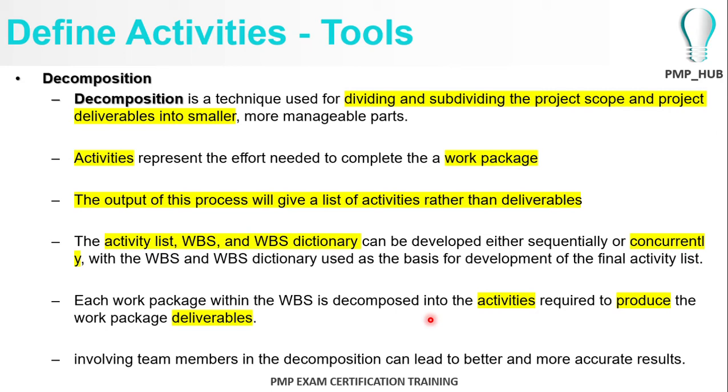In smaller projects, obviously the work breakdown structure and the activity list could be done in parallel or sequentially. But in larger projects, these could be two separate activities, two separate processes.